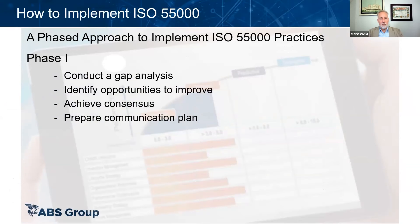We do it in a phased approach. In phase one, we do a gap analysis — either a simple ISO 55000 compliance checklist, or a more granular bottoms-up approach asking whether our CMMS is capable of supporting what we're trying to do, are we populating data, are work management processes in place. From that we identify where we're going to improve and reach consensus among stakeholders. An important part of phase one is also developing a communication plan — part of change management for an organization is communicating what you're trying to do and why.